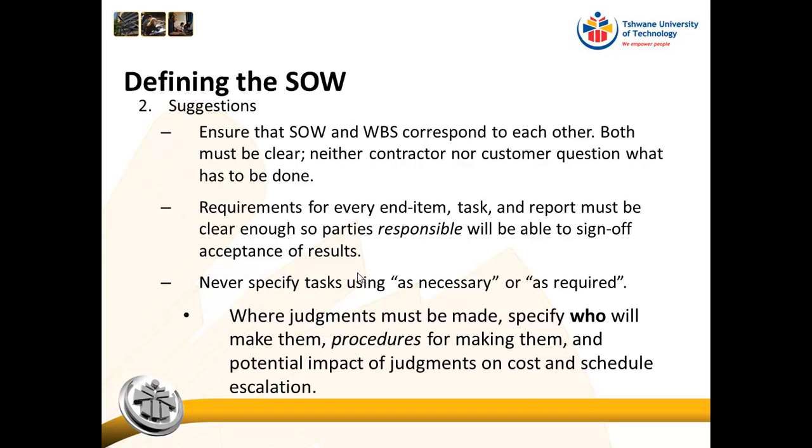So if you say it's going to be blue, that's open for interpretation, because I might say, okay, it must be light blue, and you might say, no, it must be navy blue. So you can see blue is open for interpretation. So in a statement of work, we want to say it must be navy blue, because then that is clear to everybody involved.